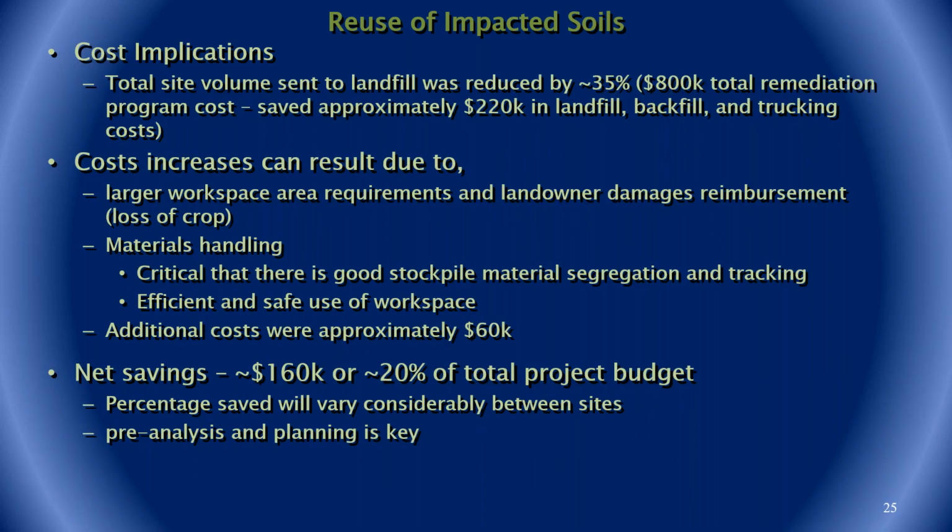And with the reuse of impacted soils, there's cost implications to consider as well. For this site, the total site volume sent to landfill was reduced by approximately 35%. For the $800,000 total remediation program cost, it saved approximately $220,000 in landfill, backfilling and trucking cost. Cost increase can also result due to the larger workspace requirements, the landowner damages, and reimbursement of loss of crop.